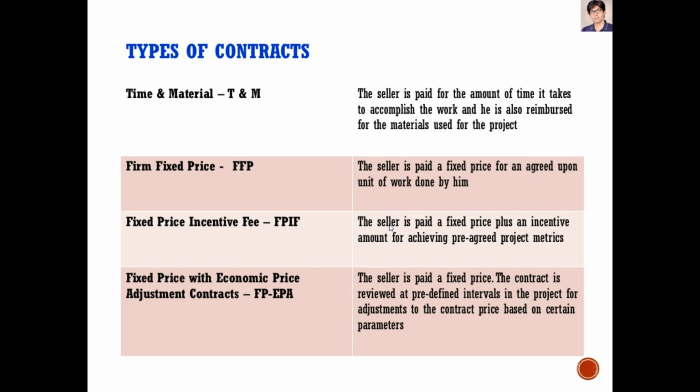So there's a lot of different types of contracts out there. And so some of these, when you hear the term, so at our cafeteria, we're gonna throw out a term for what they do. And they are doing what's called a cost plus contract. All right. So whatever it costs to provide food for the campus, they do at a percentage, then they increase right on top of it. Is there any incentive for them to save money? So cost plus contracts tend to be the last resort if I cannot find any other kind of vendor.